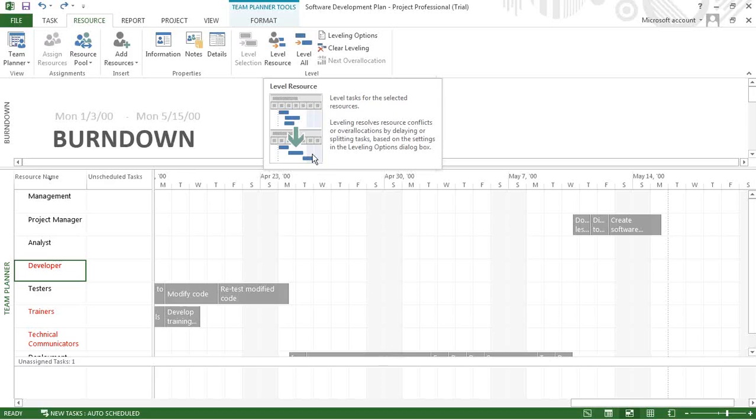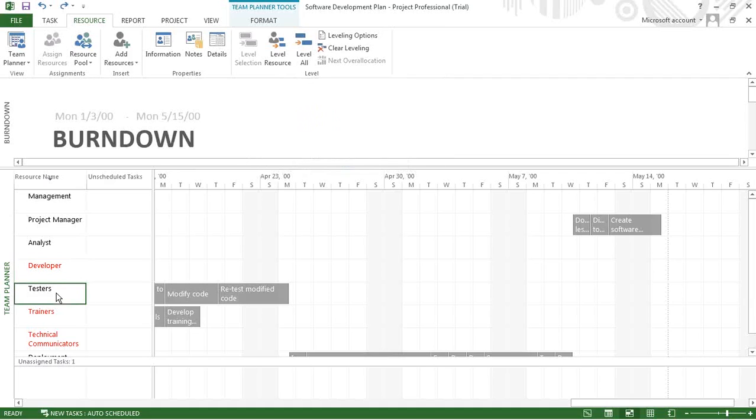The outcome of resource leveling, by default, essentially translates into an increase in schedule. So be very careful, that's what it is. It is not modifying the task, it is allocating the dates appropriately, as the figure shows.